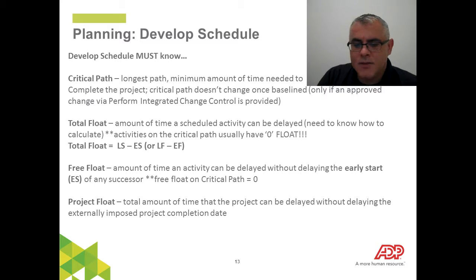So there are some calculations for understanding what's the earliest you can start, what's the latest you can start, what's the latest you can finish, or the earliest you can finish a particular activity. And that stuff really helps you understand the activities and the timing behind getting them done, and if you've got some flexibility. So if you get in a pinch, it's really important to know what your float is, what the total project float is, what the float for particular activities are, because that really helps you stay on top of making sure that you can orchestrate your schedule to ensure you complete your project in a timely manner.